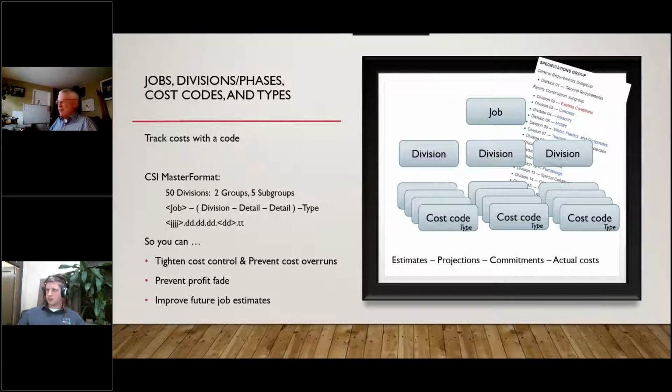By the way, if you're on MasterFormat and have been using it for the last few years, in 2016 there was a new MasterFormat established in April, and it's a good idea to consider moving over to the new MasterFormat. Just at least be aware of it. And the MasterFormat consists of 6 digits, optionally 8 digits, with divisions, and within the divisions there are groups and subgroups that cover all kinds of results that a job can have: plumbing and framing and finish work, excavating and pre-work, demo, all that stuff.